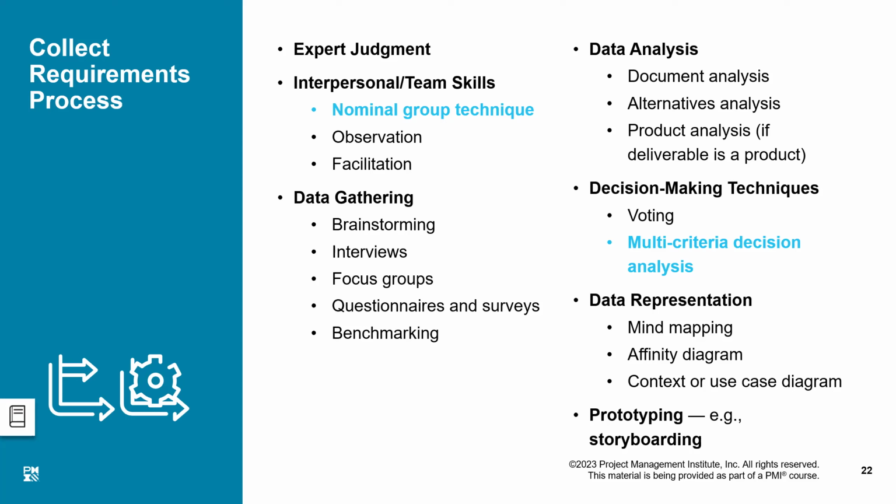Product is actually the translation of all the requirements which have been gathered. So what functions and features should be there in the product? That is going to be my product scope. It has nothing to do with how we will make it. That is the other analysis. So product analysis is the analysis which selects the right requirements which should be added in the scope of the product.